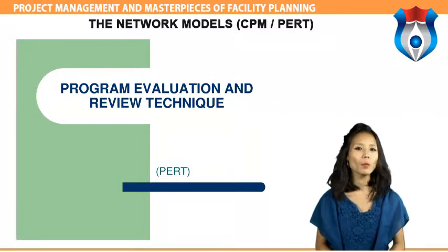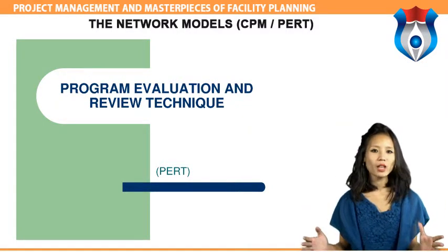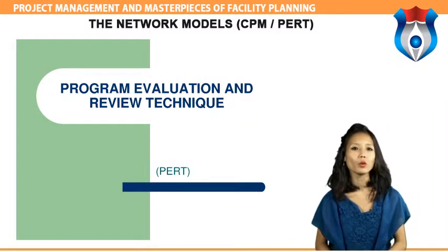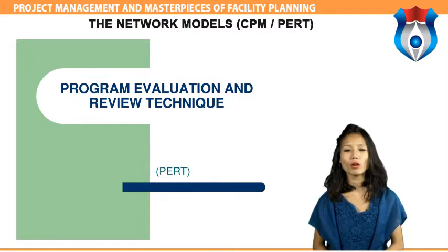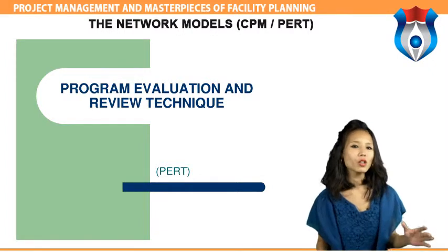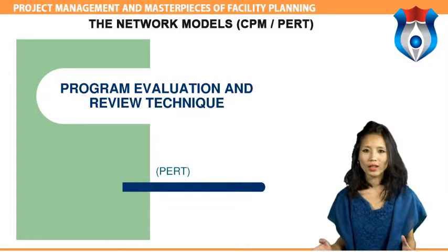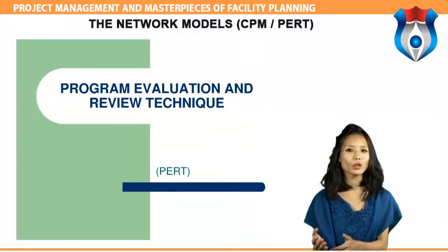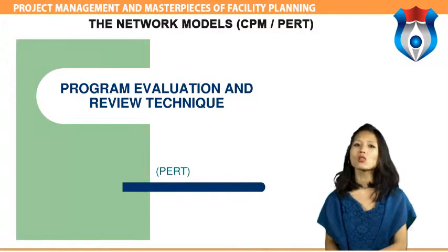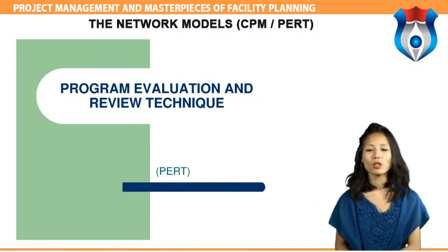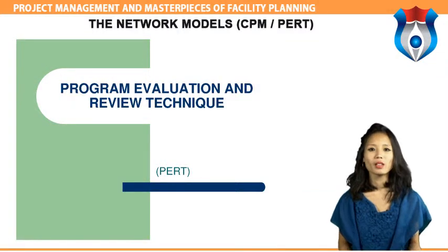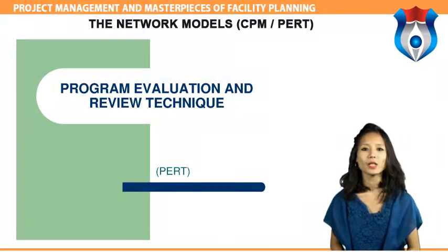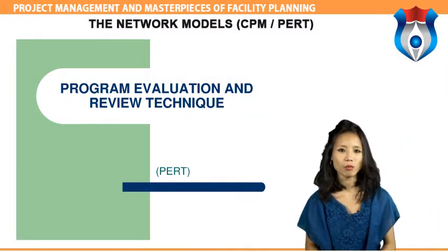So far, we have talked about projects where there is high certainty about the outcomes of activities. In other words, the cause-effect logic is well known. This is particularly the case in engineering projects. However, in research and development projects or in social projects, which are defined as process projects, where learning is an important outcome, the cause-effect relationship is not so well established. In such situations, the PERT approach is useful because it can accommodate the variation in event completion times based on an expert or an expert committee's estimates.